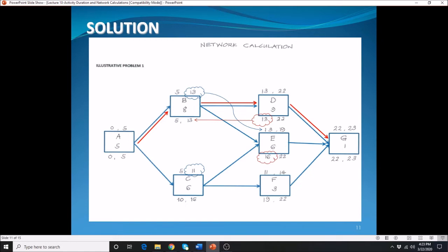But as a project manager, it is understood that in this particular case, it is the end of day convention, which means this will begin on the first day and this one ends at the end of the day. Okay, so for that particular case.